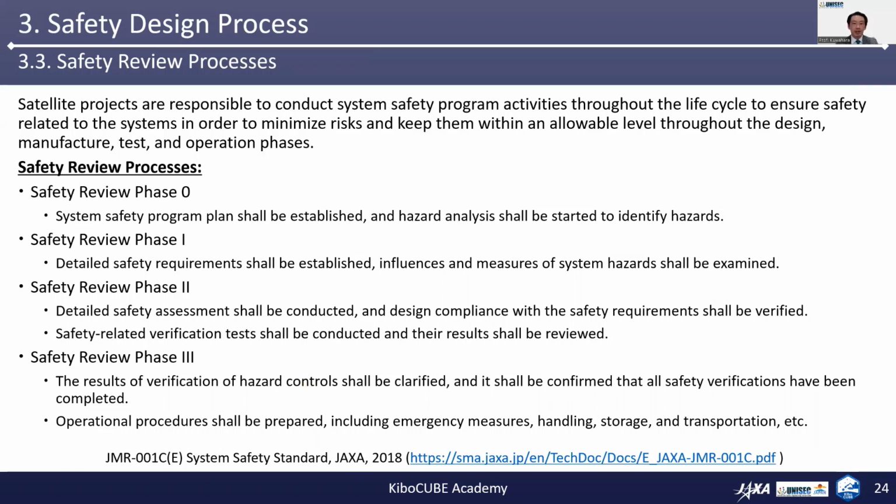First of all, in phase 0, the system safety program plan shall be established and a hazard analysis shall be started to identify hazards. In phase 1, the detailed safety requirements shall be established and any inferences or measures of system hazards shall be examined.